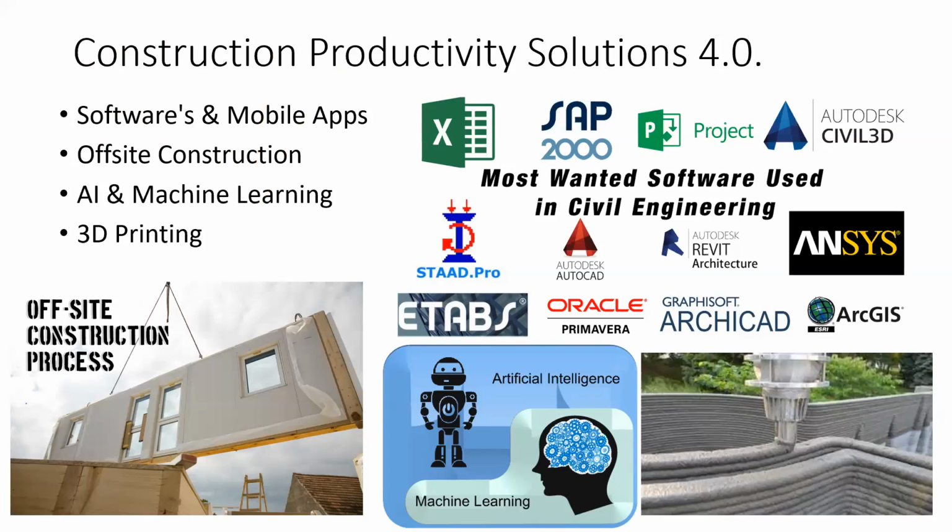By classifying and measuring quantities installed, these systems can tell you how much work was done each day, which it can then compare against your construction schedule between installed components and on-site work models, so you can quickly identify errors and avoid construction rework. How 3D printing is changing the construction industry.